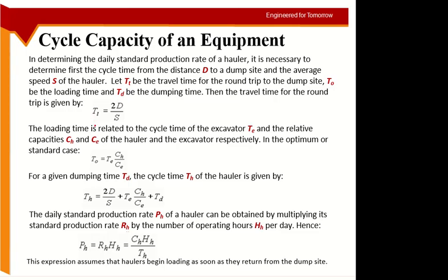Okay, 2d upon s gives you the travel time of the hauler. And then we have the loading time. T naught is the loading time. Now loading depends upon excavation, how quickly the excavation is happening.